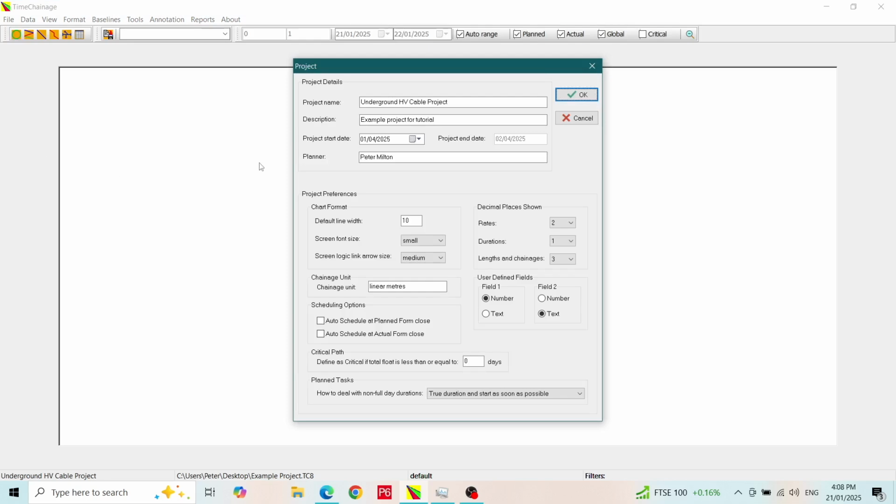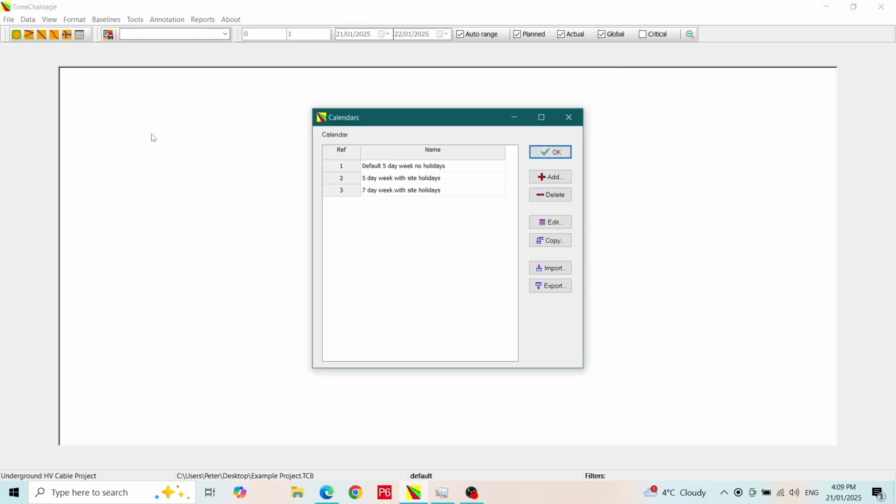Let's have a quick recap of what we did in the last video. In the project form, we entered some basic details including a project start date. We also set some project preferences. Next we went to the calendars dialog, and here we created 2 new calendars in addition to the default one. A 5-day week calendar and a 7-day week calendar, both with holiday periods.